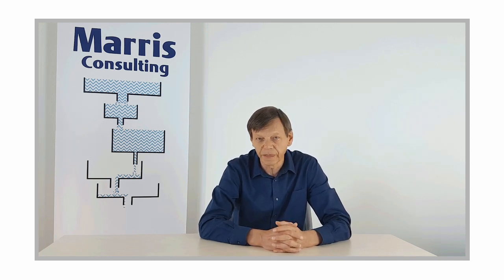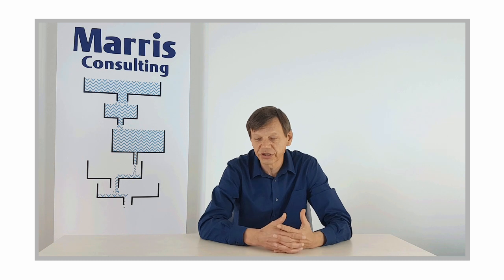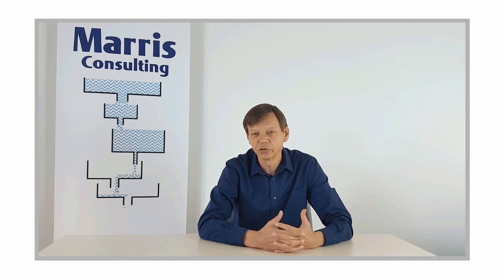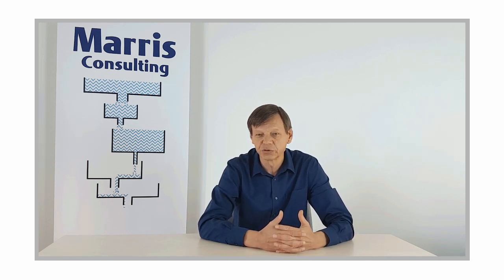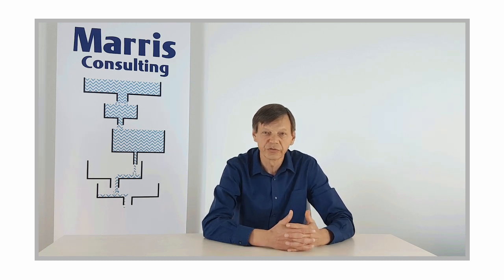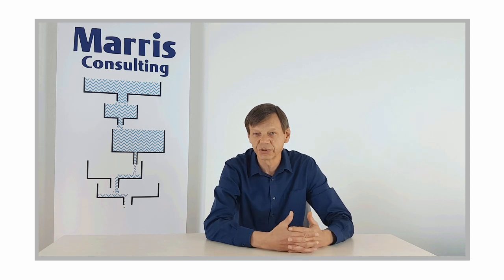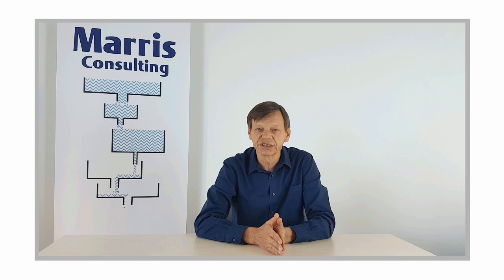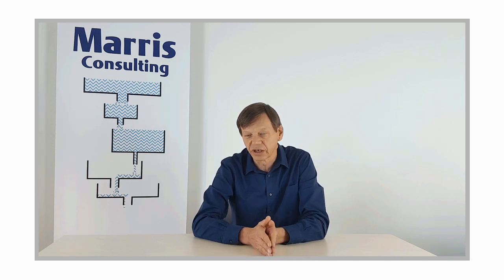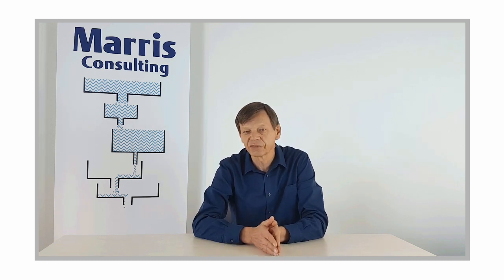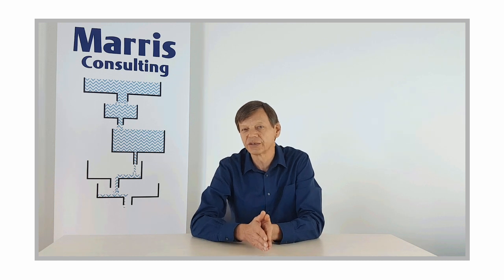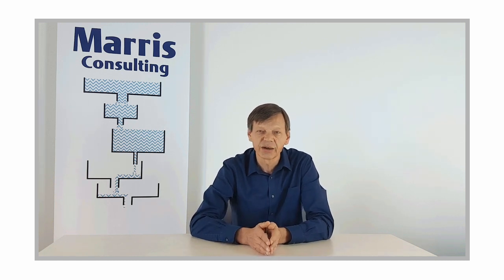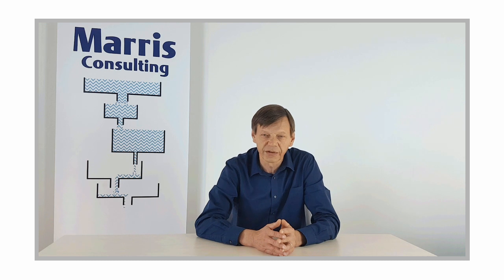So what you need to do is when you're executing in critical chain mode, not only do you note down as you execute the 2 operational pieces of information you need. The first one, obvious, which is what did I do this week, what have I been working on, and the second one, which is a little new, which is what are the tasks remaining, how much time do I have, how much time is required to finish this task. Okay, and we explained in the previous video what you do about that.